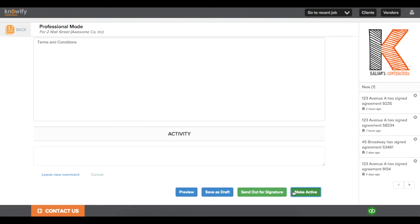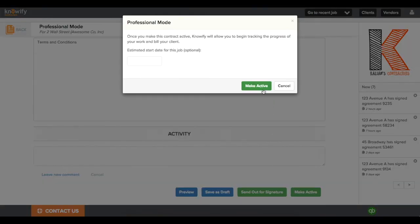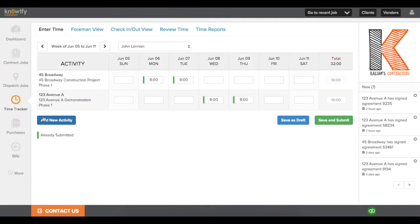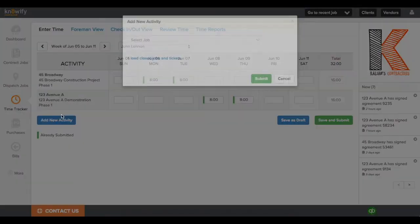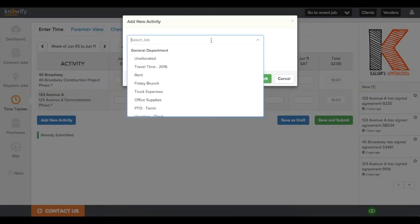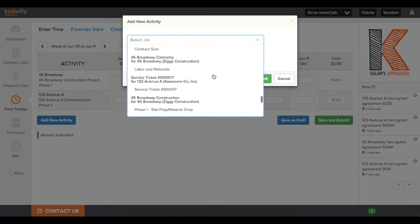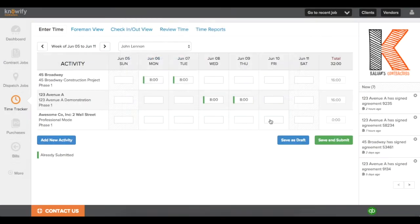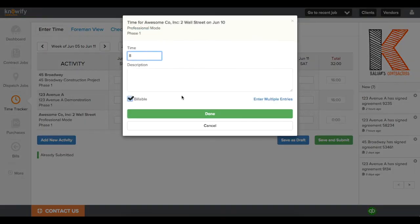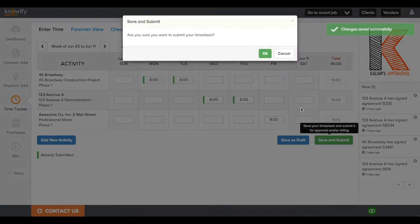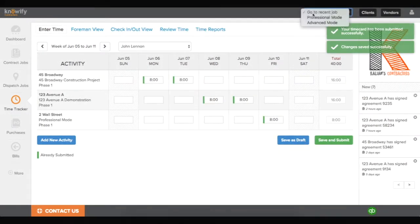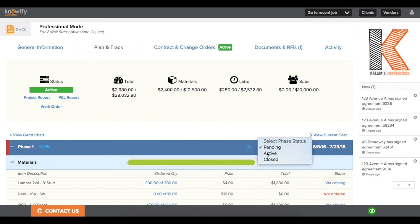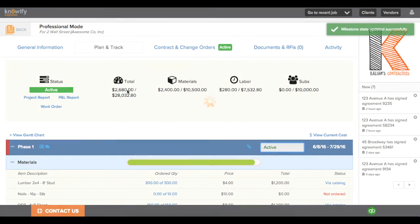In Professional mode jobs, tracking costs works just like it does in your Advanced mode, where all of your costs are going to be pointed at specific phases in the plan as opposed to just the job itself. Only now, when I go back to the Plan and Track section, I'll see an actual cost versus what I initially had estimated. This way, we can get more information about what phases of jobs are costing us more or less than we were originally estimating.